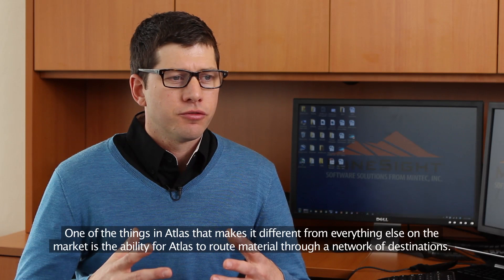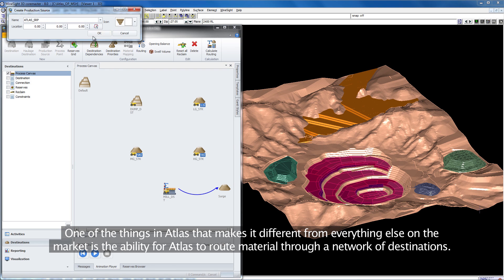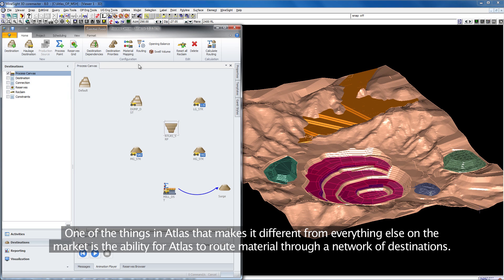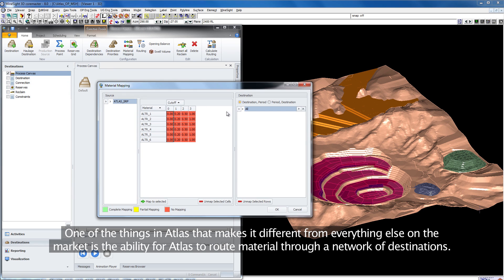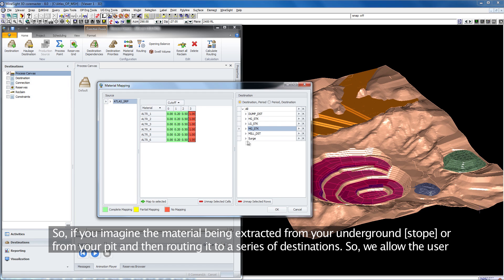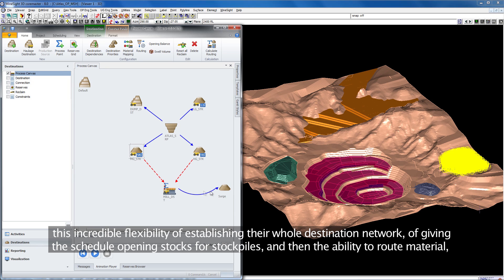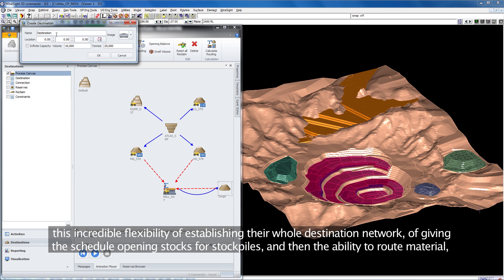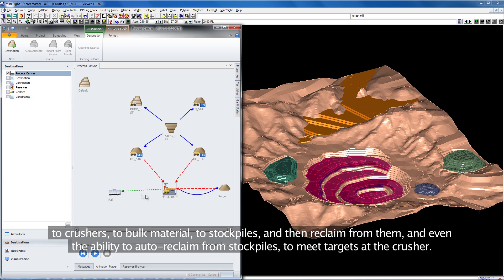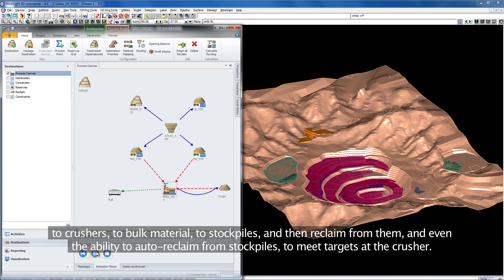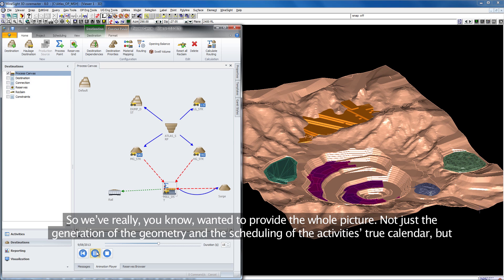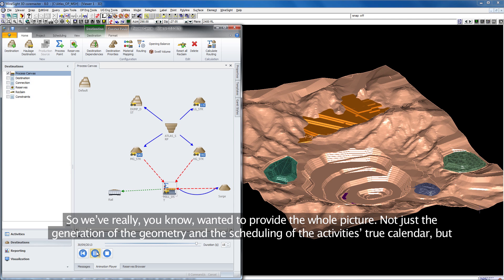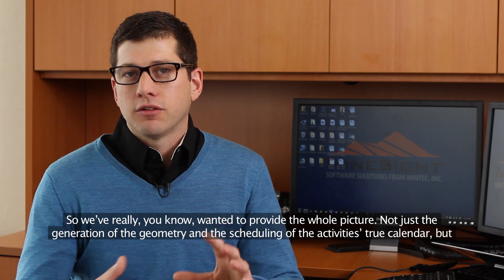One thing in Atlas that makes it different from everything else on the market is the ability to route material through a network of destinations. Imagine your material being extracted from your underground stope or your pit and then routing it to a series of destinations. We allow the user incredible flexibility of establishing their whole destination network, giving the schedule opening stocks for stockpiles, and the ability to route material to crushers, bulk material to stockpiles, reclaim from them, and even auto-reclaim from stockpiles to meet targets at the crusher. We wanted to provide the whole picture, not just the generation of geometry and scheduling of activities at true calendar.